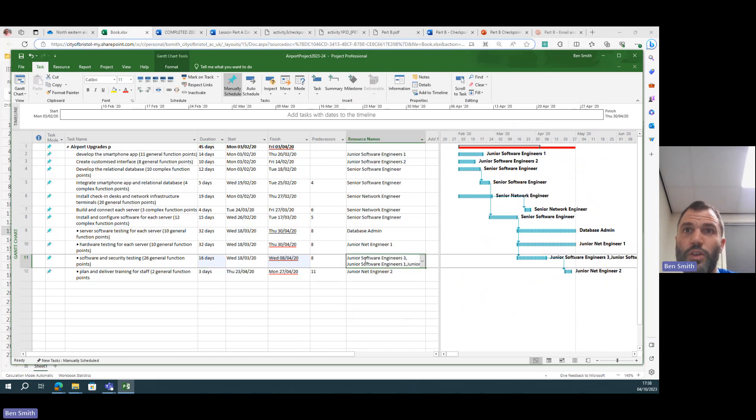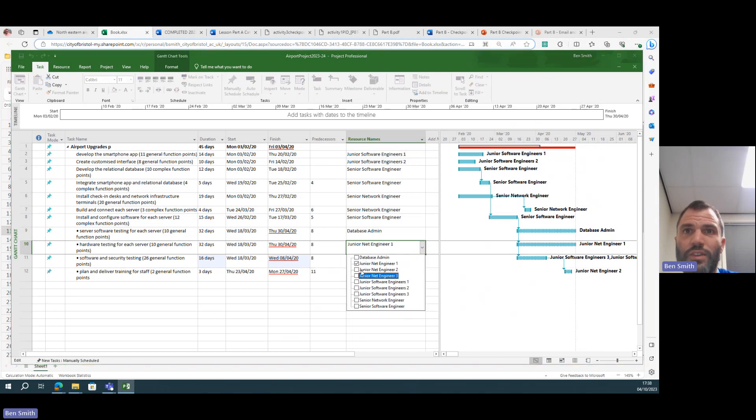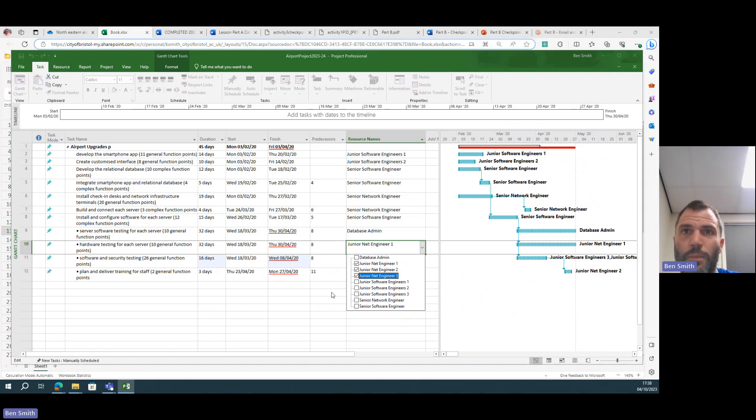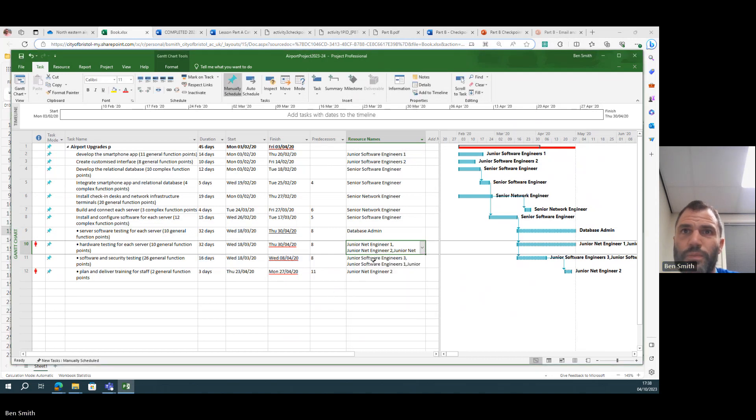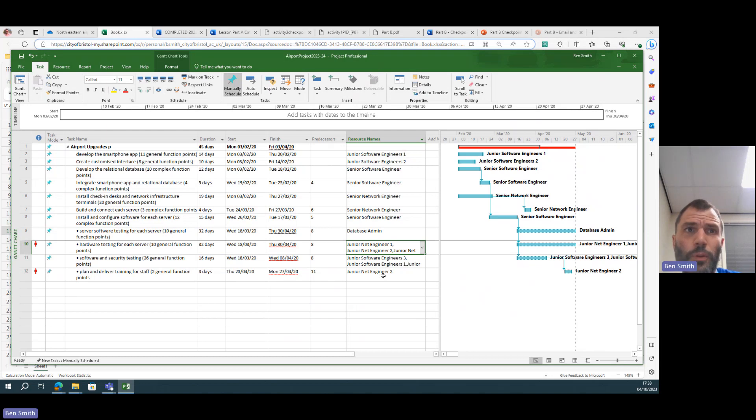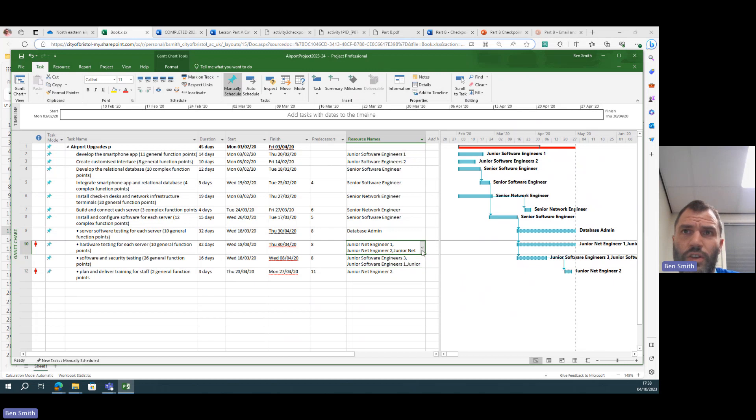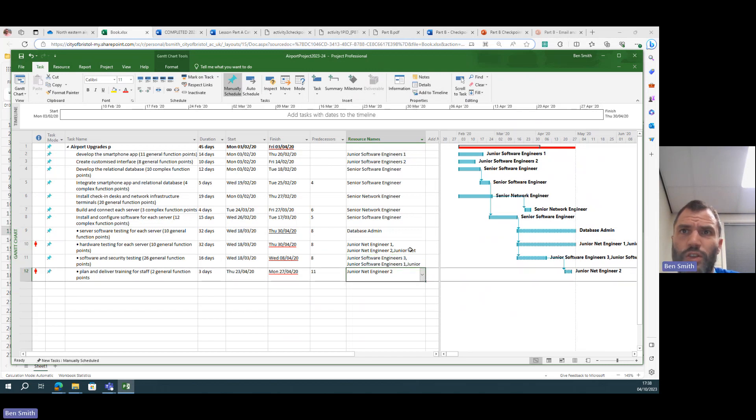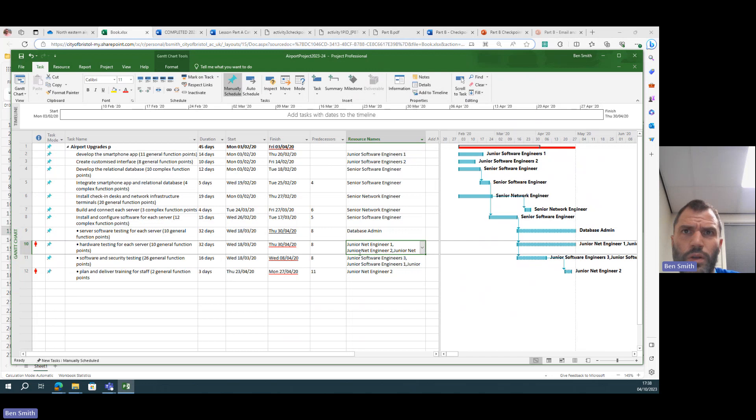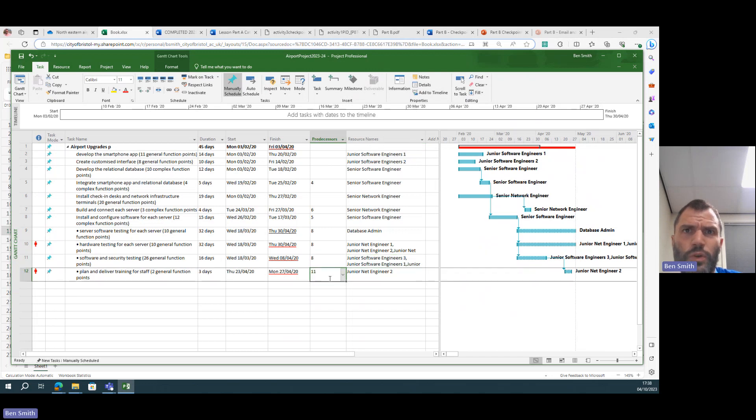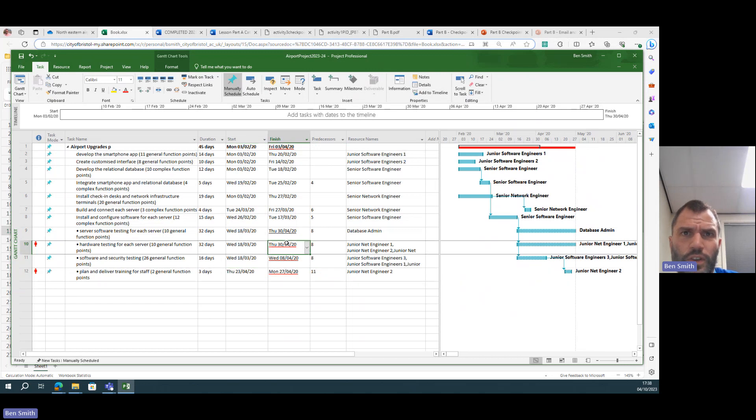And then it's cut down the amount of time it takes to do that massive task by using three of my resources on there. And I'm also going to add junior network engineer three, junior network engineers on that. Now the problem here is that one is assigned to that one, so it's kind of overrunning on that one.